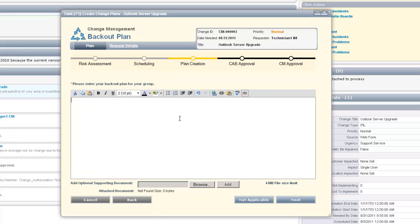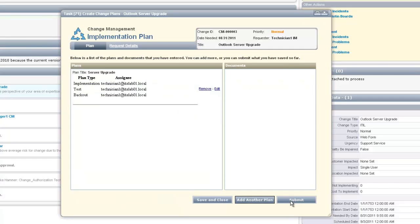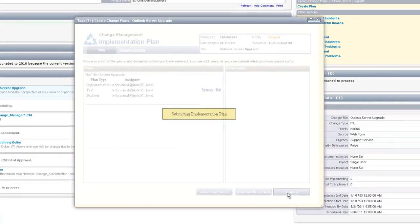The backup plan describes what happens if the implementation fails and does not pass the test — how we're going to get back to a state of functionality from before the change. For this circumstance, we're going to use a backup from the night before and revert to that state before the upgrade. We click Next, review all the plans, and then submit. We can add other plans or just submit, which is what we'll do now.